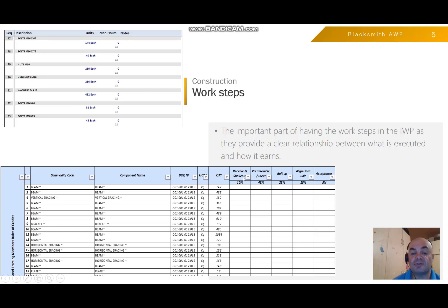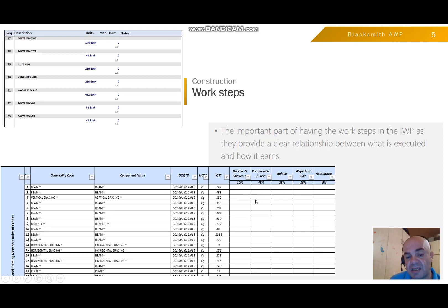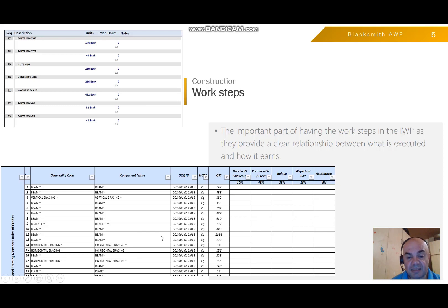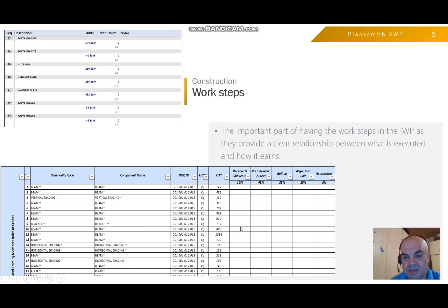Then you put the rules of credit — what you need to do and when. This plays two roles: it helps the site team report properly, and it helps them understand the scale of the job. For instance, when I see a certain beam of 700 kilos, I know what I'm talking about.